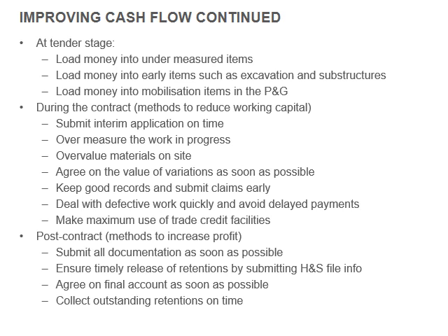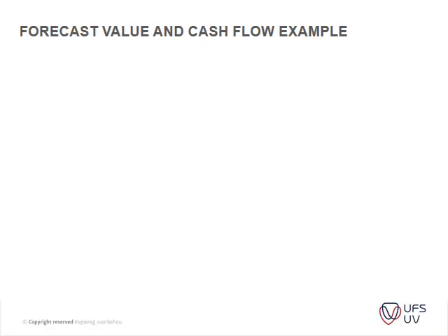Post-contract is submit all the documentation as soon as possible, ensure timely release of retentions by submitting the health and safety file, etc. Agree on the final account as soon as possible and collect outstanding retentions on time. Okay, so we've dealt with a couple of these in the previous chapter, but please make sure this is a very important slide for me. You will have to be able to discuss this.